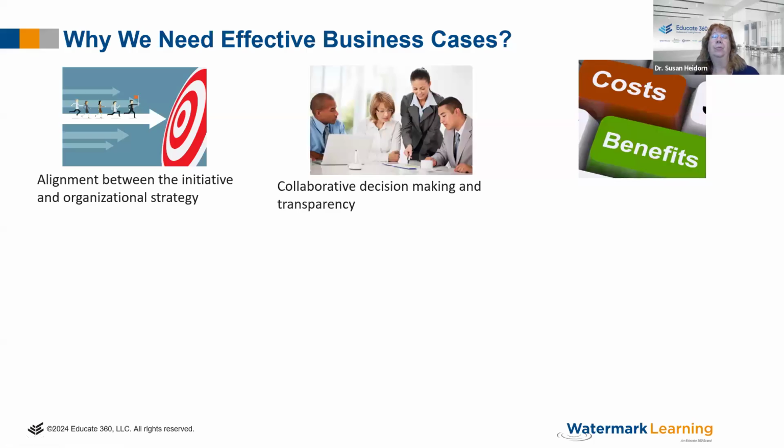Certainly, it provides us with an opportunity to do cost and benefit. What are the costs of this option? And I always think you should include more options, and we'll talk about creating options later, but what is the options? For each option, what are the costs and what are the benefits? Here's what it's going to cost us to implement and or purchase and support. And these are the benefits we're going to try and get out of it.